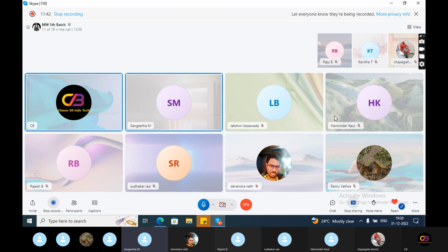Based on each industry, a trial version will be given to the client for 30 days on the sandbox. The client will test business scenarios, check if the business requirement is working, and whether IT infrastructure can be ready or not. By the end of this phase, the customer will finalize whether to go with this requirement or not.